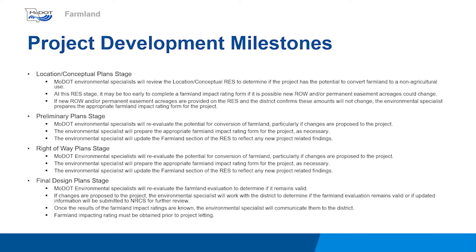If impacts to or conversion of farmland have not yet been evaluated at the time the district submits the RES for the preliminary plan stage and/or for the right-of-way plan stage, the Environmental Specialist will determine if the project will convert farmland. If so, the appropriate farmland impact rating form will be prepared and submitted to NRCS. The Environmental Specialist will provide the district with any new project-related findings via the RES response and discuss appropriate actions with the project manager if necessary. If new right-of-way and/or permanent easement acreages are still not fully known, the Environmental Specialist will reassess impacts to farmland at the next RES stage.